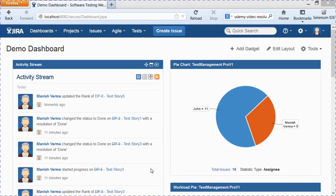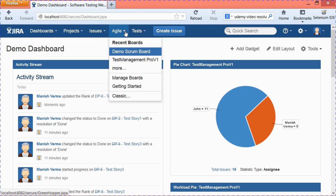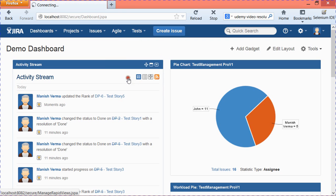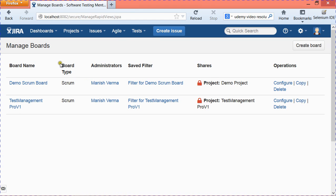Hello everyone, welcome to session 2 of module 6: creating and managing scrum boards in Jira. In this session we will learn how to create a scrum board and manage it. To create a scrum board, you first need to go to the Agile tab at the top, select the drop-down, and click on the Manage Boards link. It will open the Manage Board page and show you the existing boards in Jira.